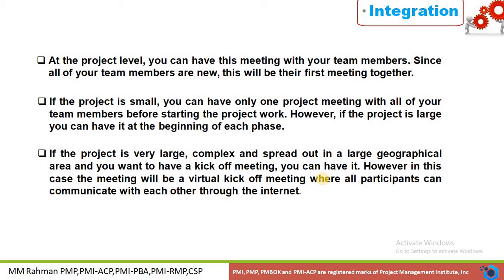If the project is small, we can have only one project meeting with all of our team members before starting the project. However, if the project is large, then we can have a meeting at the beginning of each phase. If there are a number of phases in a project, then when we are going to start a new phase, at that time we can hold this project kickoff meeting.